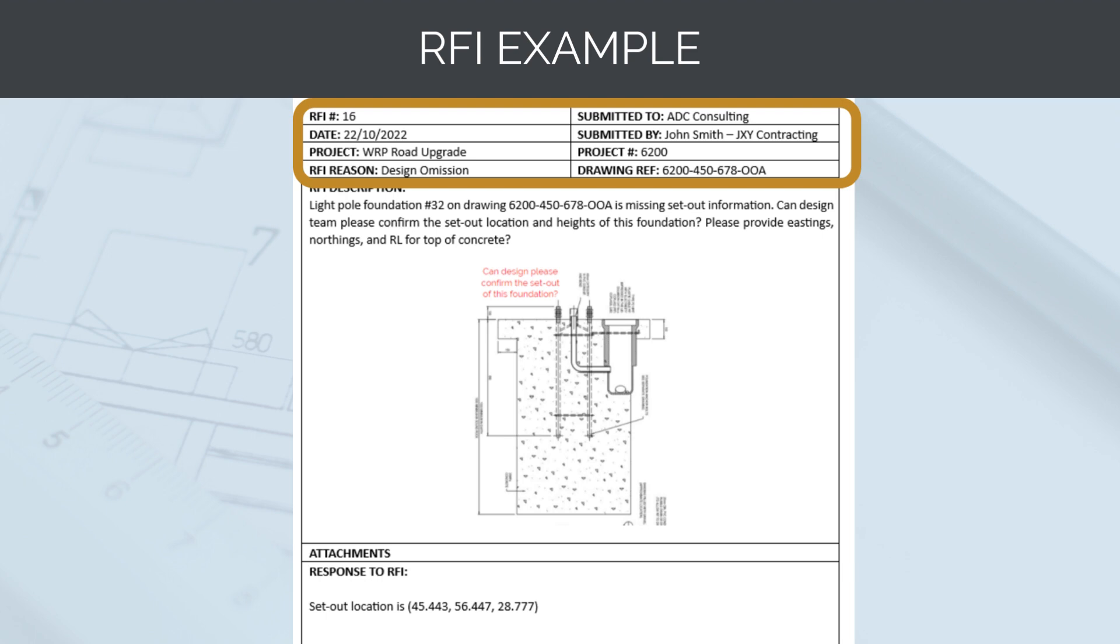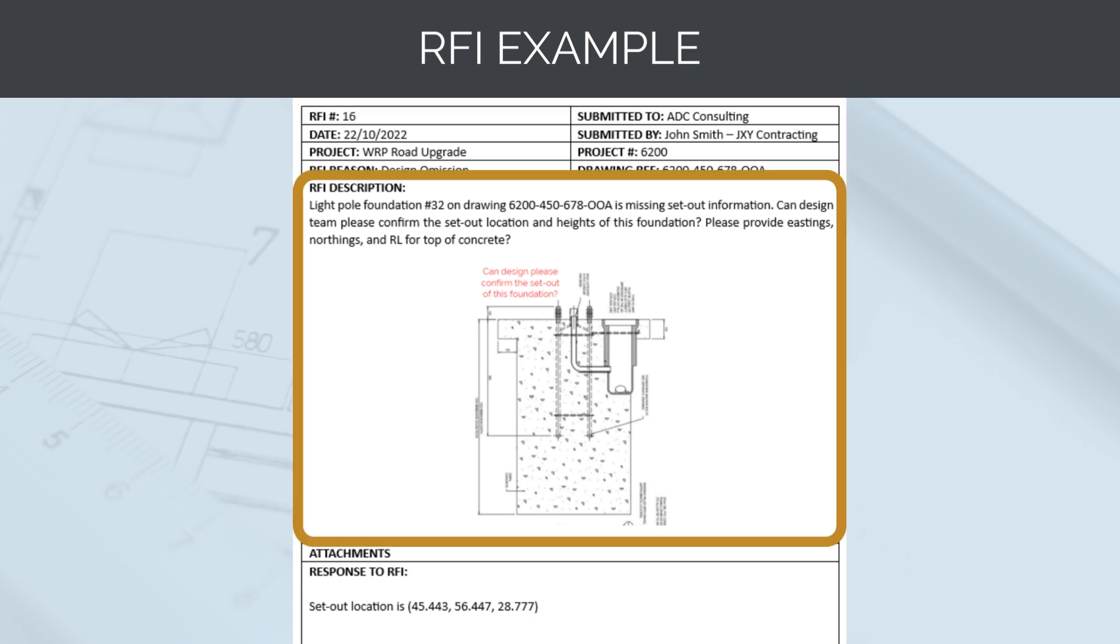The reason for the RFI is a designer omission. This means the information should have been in the IFC design, but by the fault of the designers, was not. The drawing reference has also been noted down. The question for the designers has been clearly articulated.